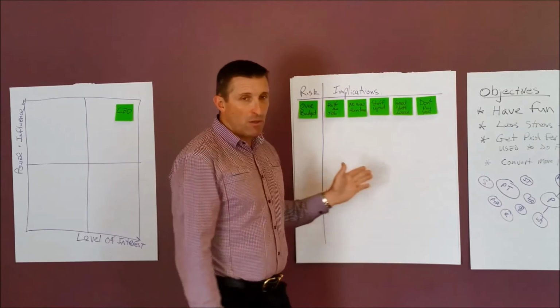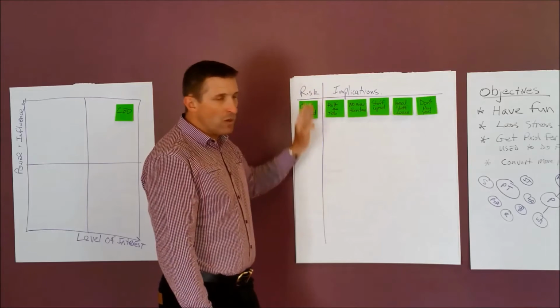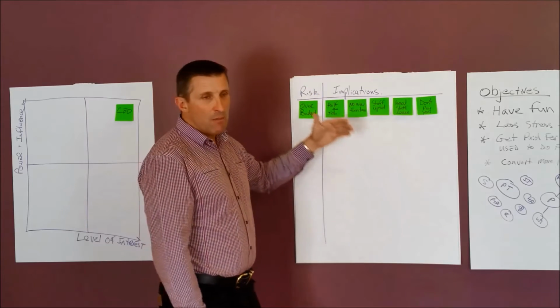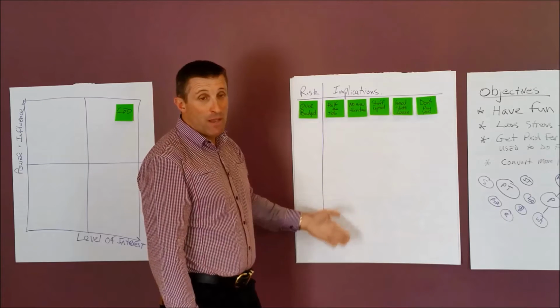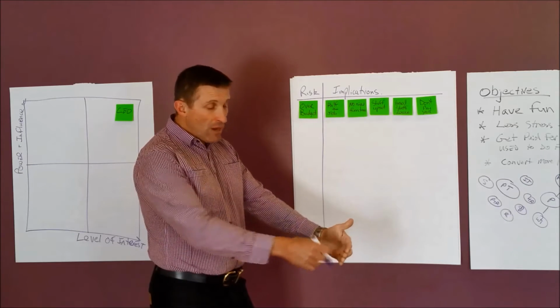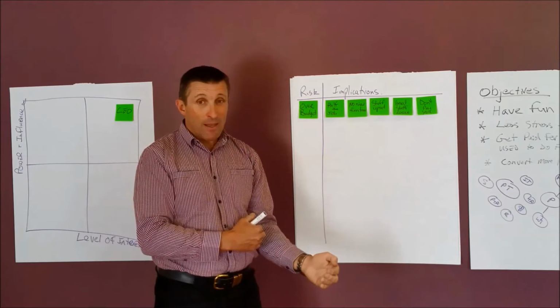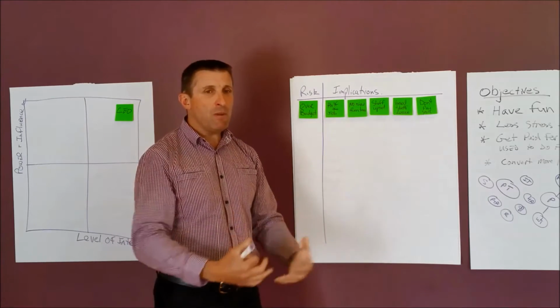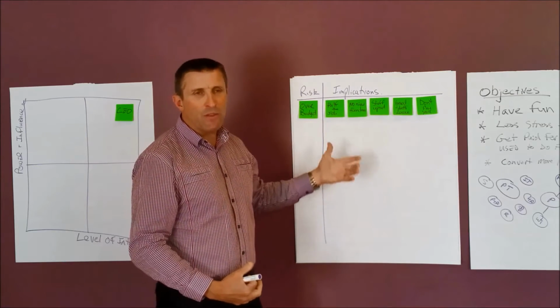And the thing is, like me, your projects will all be pretty similar. So when I'm doing a project, say a procurement project, the first 15 risks are the same every time. And so I have them written down. I have them in my risk register from last time. I just pull that out and I have it down there. So that's my prompter. So I can then be prompting them: here's the risk. Have you thought about this one? Have you thought about that one?